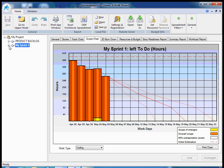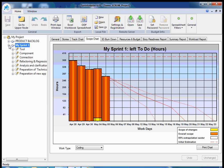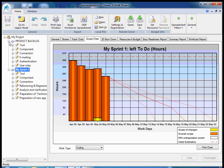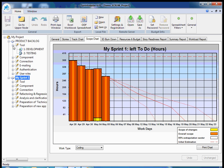Also an interesting feature is that sometimes I need a product backlog. And it's possible to support it in Sprintometer. I can define a sprint called product backlog, like a dummy sprint, and define all user stories for that sprint.